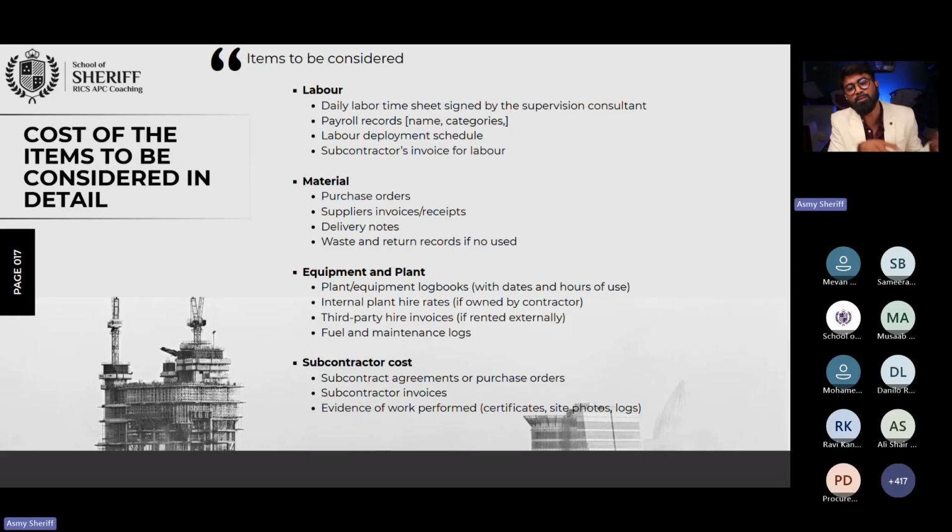He used his own machineries, but because of some disruption claim, he tried to get some kind of 800,000. It's an 8 million riyal, 800,000 Bahrain dirham from us. And we asked a simple question. Okay, submit the backdated contract or maybe plant rental agreement and make sure that it's going to be chambered by the Chamber of Commerce.